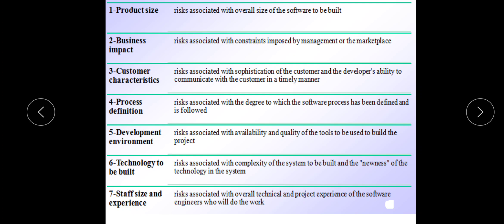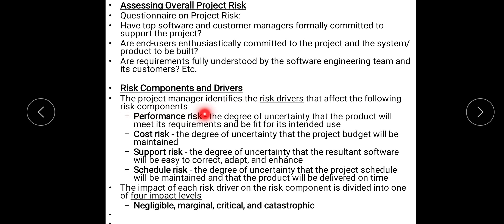Next is assessing the overall project risk, where we can assess the risk by asking many questions. Then we covered risk components and drivers. It is the responsibility of the project manager to identify the drivers that affect risk components like performance risk, cost risk, support risk, etc. The impact of risk drivers falls into four impact levels: negligible, marginal, critical, and catastrophic.